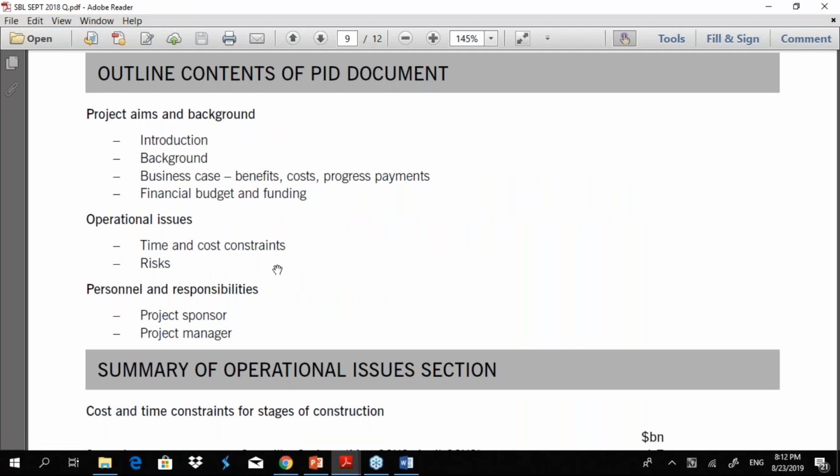So that's another point that you must bring in here. Assumptions in terms of project costs and timings. Under that, you can actually develop assumption about labor, finance, and under finance, you can talk about working capital, how the funding is going to happen. So there's a lot of room for you to develop. So assumption is another key factor that you can work on.